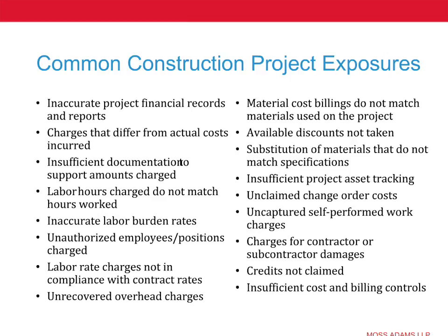Some organizations go to the point where they'll not only track commitments, but they'll also track open commitments and closed commitments. An open commitment is one where the subcontract isn't completed or the work isn't complete, and a closed commitment is one where the work is complete. Understanding those two aspects of commitments helps organizations know whether or not they overran a subcontract. But at a minimum, you absolutely need to know what contracts you have out there against the various obligations or budgeted obligations you have for the work that's going to be performed under your schedule of values. And having an up-to-date, regimented approach to that is important.